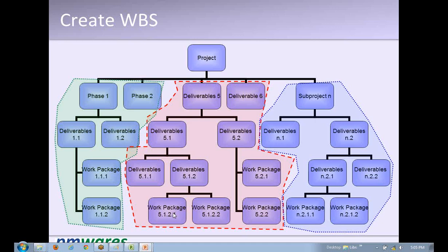That means I get significant progress on that, and I can easily figure out whether this is going well or not going well. I need not go find out too many details. Its progress will tell me. So that is what I normally define. Like in software projects, we normally define 8 to 80 hours. Don't define a task less than 8 hours, or more than 80 hours.